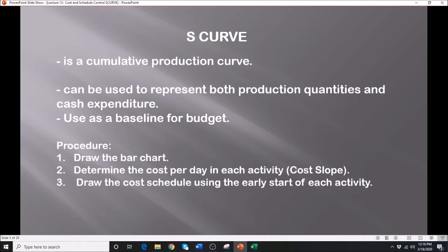All right, so there is a procedure on how you are going to create the S-curve. In our case, as usual, I uploaded supplementary documents that will back up our videos and our PowerPoint that will help and guide you through the lectures. I'm going to show you in a bit. So what is the procedure in creating the S-curve? First and foremost, you have the data: the activities, the duration, and the cost of each of those activities. That should be prepared at the beginning.